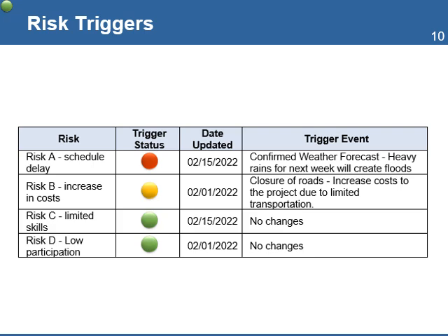One good practice is to develop an early warning system. This can be done by publishing the risk log with a color indicator that represents the trigger status for each risk, from green to red. As the possibility of a risk changes, the project will update the risk log and change the color assigned to that risk. The table below shows an example.